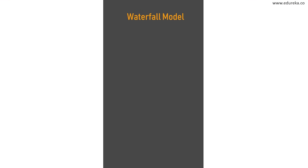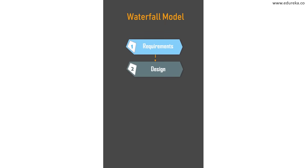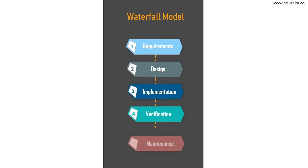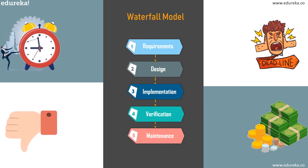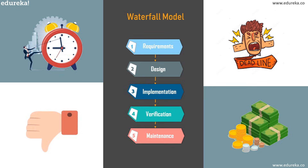Traditionally, most software projects are managed using the traditional waterfall model. The waterfall model is basically a linear model and it delivers all the product deliverables at one go, at the end of the project. It can be a tedious and time-consuming approach, and because there is zero visibility and not much stress is put on client feedback, your product might not be what the client exactly wanted.